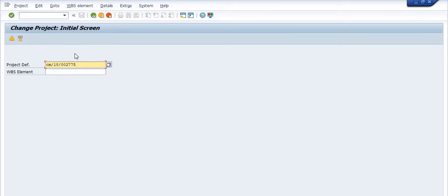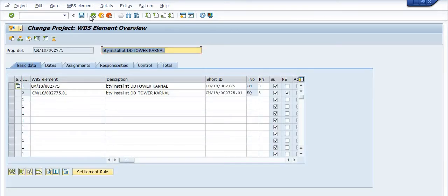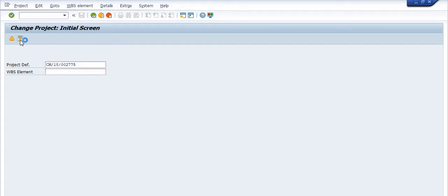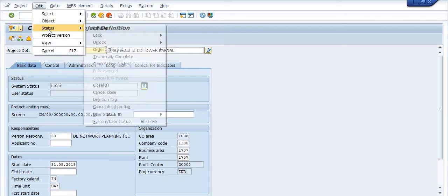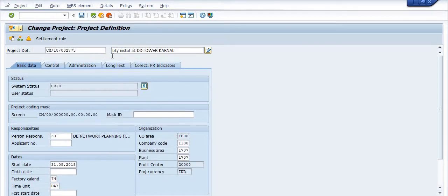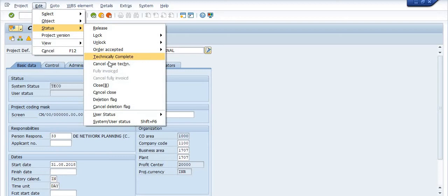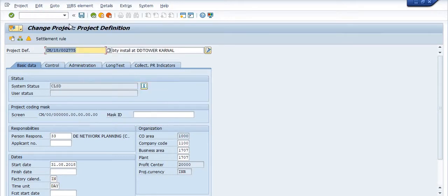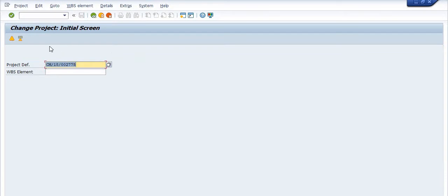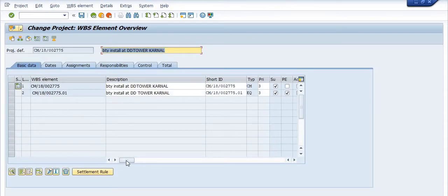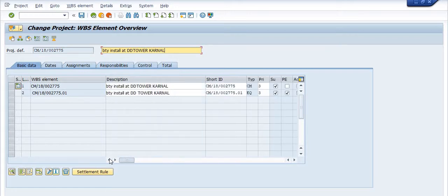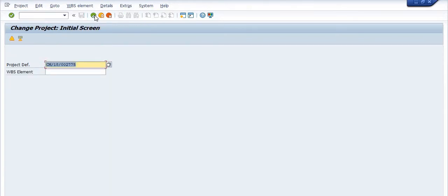First, click on Enter. Only one element is there, don't need to close the whole project. Click on this project definition, go in the Edit tab, click on Technically Complete. Again go in the Edit tab, click on Close, then save. Again click on Enter. Check the status of the WBS - these are closed. Once the WBS is closed, you will not be able to do any activity.